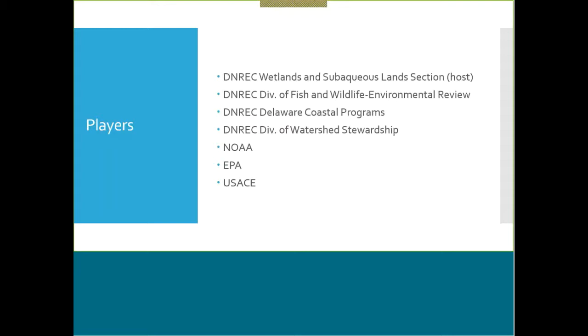Yeah, typically the first major thing that we're looking for is a delineation of the project site, so showing the extent of the navigable waters and the waters of the U.S. Obviously, we want to see some sort of evidence of erosion, whether it's survey information or just historical aerial photographs that show the extent of the erosion, because if you don't have erosion, then you don't have a project. The time of year is important. When will the construction begin and end? Those are all important as far as potential EFH impacts, or if there are ESA impacts.